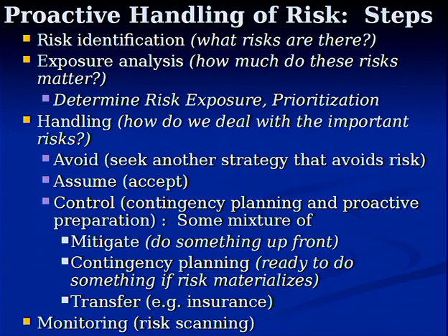You can accept it and just say, look, there's not much we can do about this risk, but we'll consciously take it on and be vulnerable to it. And we're aware that this is a danger, and you document it for my sake so that I'm aware that you're taking that on. Okay, but more commonly than that, folks, you want to deal with one of a couple things. You want to mitigate it. You do something up front before it materializes that will either, and this is very important when I say mitigate, either lower its probability of occurring, or if it does occur, it has much less impact.